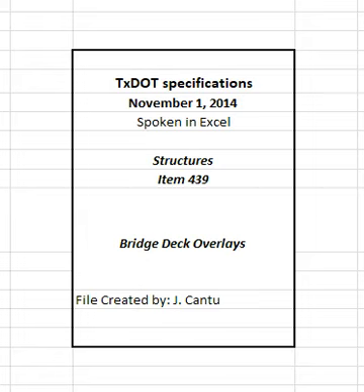5.1.4 Work Plan. Submit a work plan for constructing the overlay including at least the following: proposed equipment, materials, and procedures for preparing the surface and placing the overlay, proposed removal and replacement of existing non-compatible deck repair materials, repair procedures for patching deteriorated areas and repairing cracks exposed by surface preparation, and an anticipated schedule for traffic control. The work plan must meet the approval of the manufacturer of the polymer overlay system. Any deviations from the application prescribed by this specification must be approved.